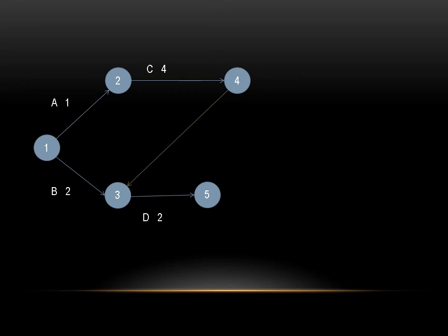Time is equal to 0 days, so we don't write anything, it is just for reference. Okay, D was preceded by B and C, so we put a dummy towards B and we write D. You might also ask why we have not put an arrow in the reverse direction. B to C means 3 to 4. Why is the arrow not from 3 to 4?